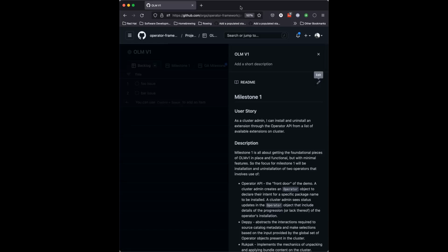UX. Yeah, so my concern with putting that in right now is that the operator only has a concept of installing whatever the bundle is. It doesn't have anything beyond that. You could technically put a scope template or something in there, but I'm afraid that by putting this in right now, we're inflating the scope of the milestone, and I really want to avoid doing that. I would like to have as tightly scoped a milestone as we can, so we can get something out in front of people and start collecting feedback. By pushing this into the default right now, we're just inflating it.